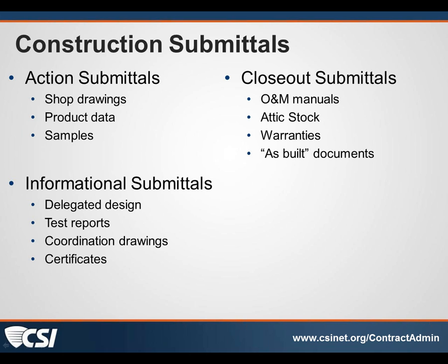Doug, anything about action submittals you want to add? Another item that might be an action submittal is a mock-up, whether it is on the site, in which case it's not really being submitted, or a smaller mock-up like a casework sample, a section of a piece of casework or some specialty woodworking item. That also would be an action submittal where we are reviewing it and making comments, approving it.